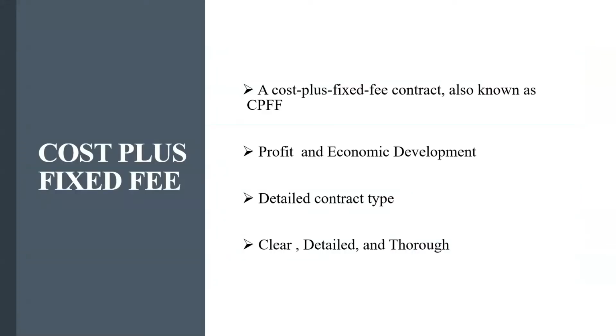Cost plus fixed fee. A cost plus fixed fee contract is known as CPFF. It is a contract in which the cost is reimbursed for all consultation services and resources used in construction or a project, such as salary, overhead, and direct costs, non-salary expenses, and fixed fee.